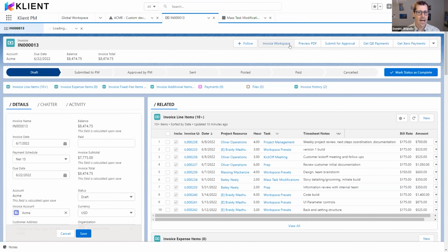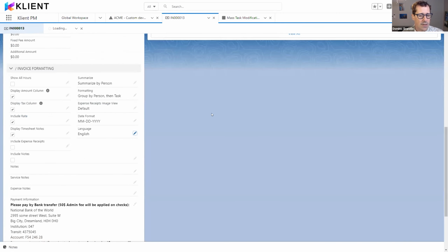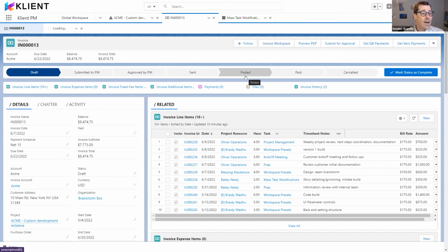And the nice aspect, or at least my preferred one here in invoicing, obviously, is the Invoice Workspace. So as you're generating your invoice, using generate invoice, it's bringing over all items from a project that fit the criteria: approved timesheets, expenses, completed milestones, and maybe project billings. Everything that's done is pulled into that invoice. But that doesn't mean that everything needs to be invoiced right away.